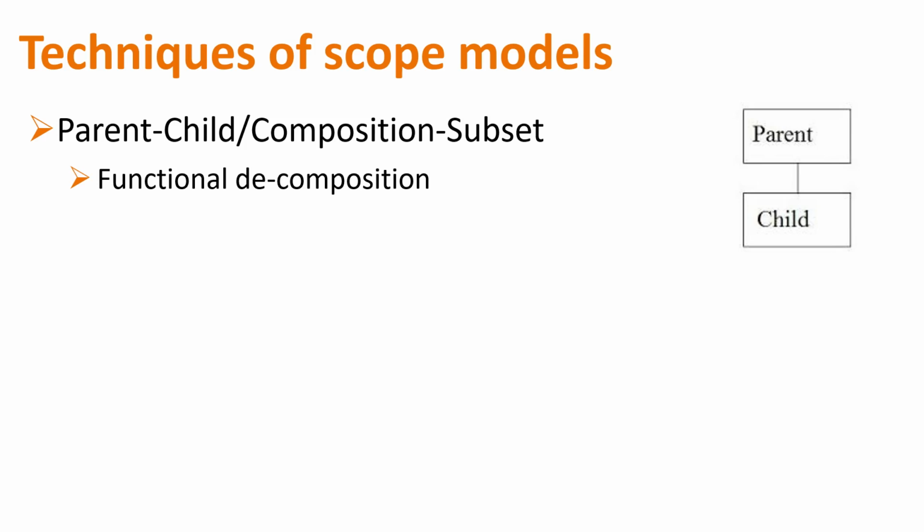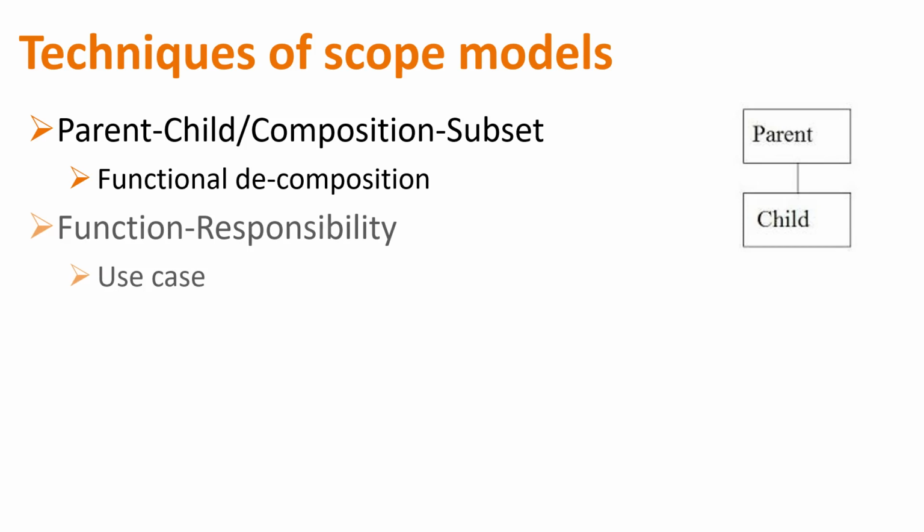You can do it very, very structured. That's where you have your decompositions, where you say, here are all the functions in the organization and how they break down, and what they do and what their capabilities are. And then you can highlight the areas that aren't doing well, right? That's a kind of a scope model. You can do that for both functions in an organization and functions of a solution. So functions of a solution, you'll probably call those features, but it can work for either technology and non-technology.